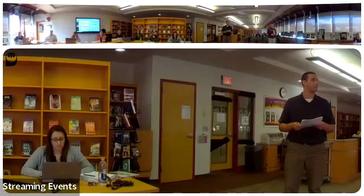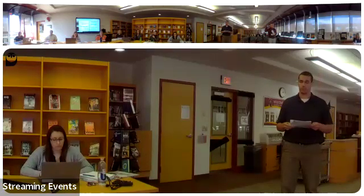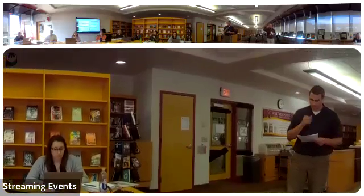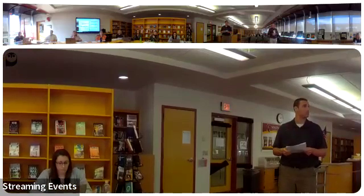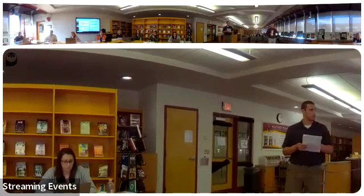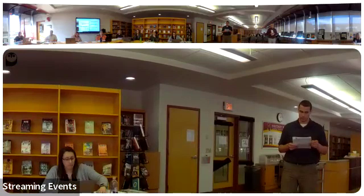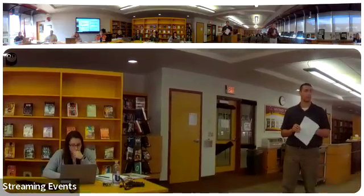So that's what that note was, because it was gonna hold up installation of the walls, because we wanted to get the new mods to the ceiling in before that. But since we pivoted as of late last week, we can finish the flooring, get that brought up, and then start walls, which will help the mechanical, electrical, plumbing trades get their rough in and help advance the work in that space.